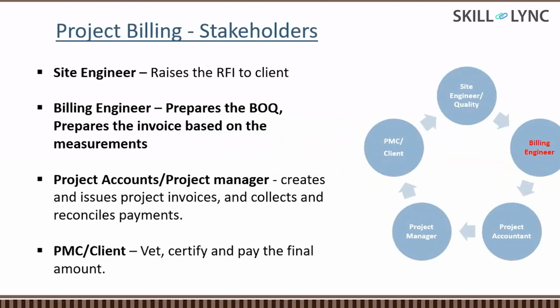So first of all, the site engineer and quality engineer will be executing all the works. They will be raising the RFIs, compiling all the documents, and recording all these RFIs. At the end of the month, they will be giving all these documents to the billing engineer. The billing engineer will be doing all these things.